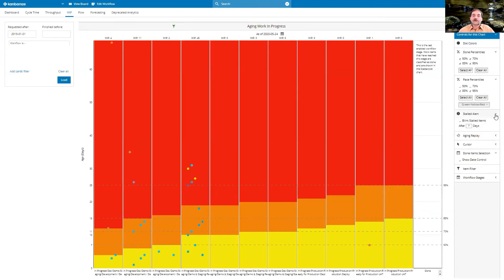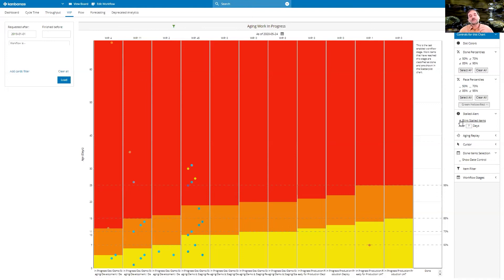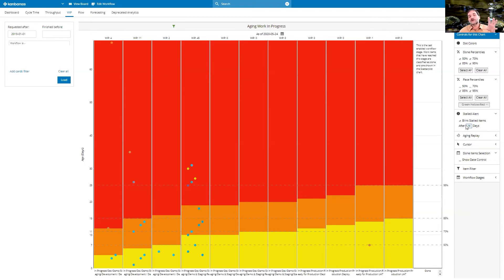Another really great tool that I like is the stalled item alert, which shows you blinking all the items that have not moved in a certain number of days. In this case, seven days. If I put that to 14 days, I will see there are still a few left. So there we can delve deeper as well.